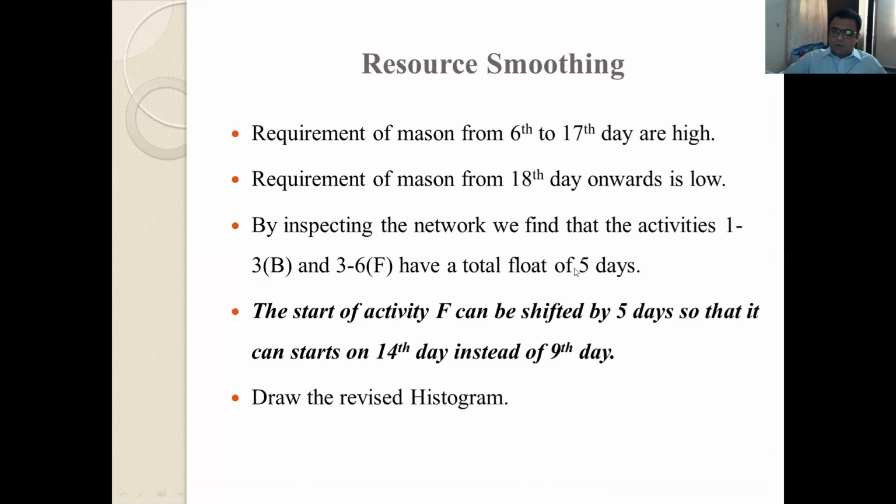Now students, what is meant by float? That much duration is available with that activity, so the start or the finish of that particular activity can be delayed. We can delay the start of that activity by 5 days, or we can finish that activity 5 days later, if it is started on the earliest starting time.